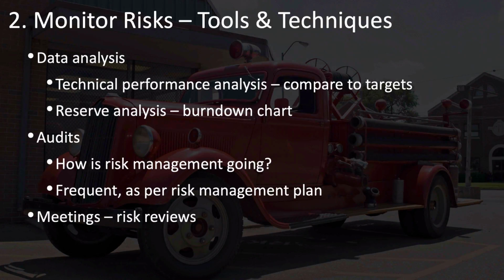We have just a few tools and techniques for monitor risks, starting with some data analysis tools. The first being technical performance analysis, and this is where you compare your actuals to your planned targets when you're comparing your work performance data and work performance reports to your risk register and risk report and what you'd planned in your risk management plan.